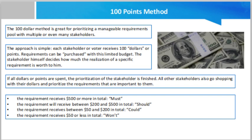Even though this type of evaluation is one of the simplest, we often observe that requirements are very strongly ranked at the lower or upper limit of the scale. Requirements that are in the middle range are found proportionally less often, for the reason that numbers are abstract. A classification with, for example, important, not important is more concrete. A scale that is too large leads to uncertainty. The ratings are mostly oriented to the edges and the middle of the scale. There is hardly any rating in between.